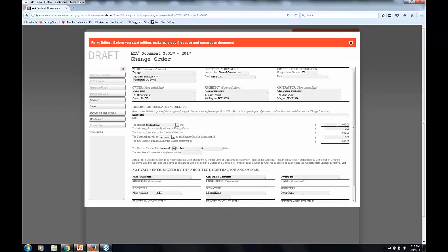But I know that obviously most people think of change orders as being dollars and cents, so that's where you get to the next part. So the original contract sum, or GMP, was, and this again comes from the project data, so I just put in $1,000. Prior change orders, there weren't any. So the third line is just adding up these two lines. So that's all the first 3 lines are.